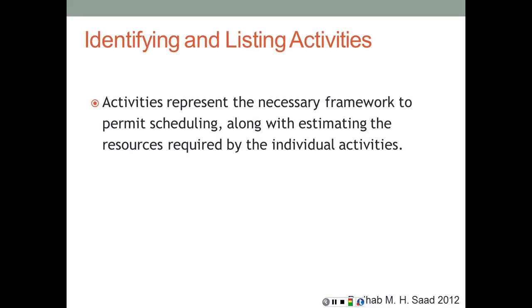That's why we might end up having something like an activity form that shows the name of the activity, its location, who's responsible for it, what kind of resources are going to be involved, and the rates of application or rates of performance of these resources. That leads at the end to the duration of the activity and the cost of the activity.